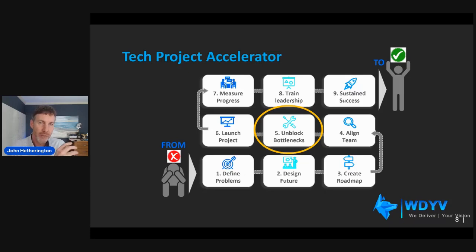So the first thing I did was work with my team to say, let's have one format for the reporting. So it's streamlined all the way up from the individual contributors all the way up to the steering committee. So we had one PowerPoint, one page format for everyone. Again, sounds pretty obvious, but it made such a difference. And once we introduced that, it just sped up that process immensely.